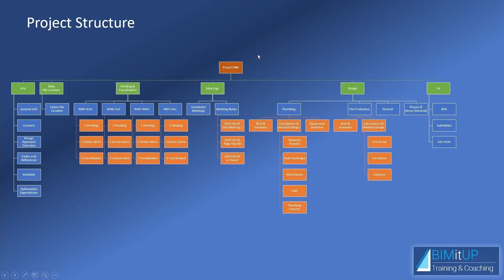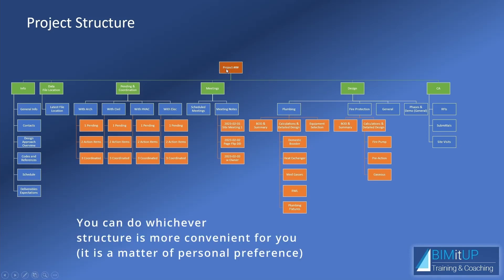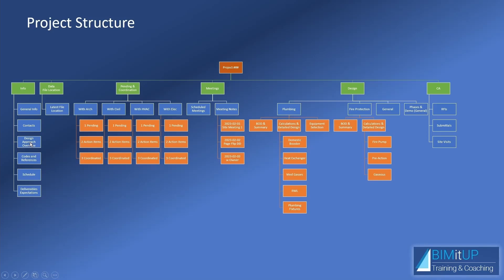Every project is different, but there are similarities. In my typical project structure — which you can tweak for your specific needs — you have a project number with general information, contacts, design approach, codes and references under which you'll design, and a schedule. You'll have deliverable expectations: schematic design, design development, 50% construction documents, etc. Then coordination grouped by discipline — fire protection, plumbing, architect, and so on — listed chronologically.